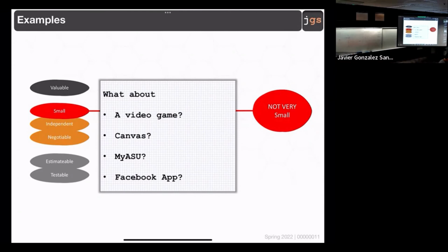So is a requirement something that must be implemented, that is part of the whole concept, but cannot be implemented in alternative versions? Connecting implementation with requirements. A requirement is something that one developer in the team is going to be responsible to do in one period of time. One period of time, usually 1 week.